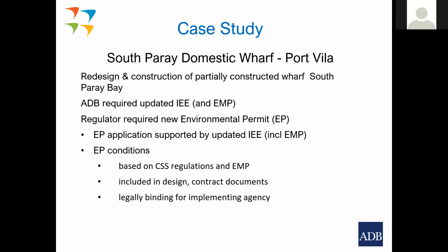Okay, cheers. This first case study for today is South Parade Domestic Wharf in Port Vila. Port Vila is the main shipping port in Vanuatu, and it's vital for serving the outlying islands. In 2016, the construction of the new wharf commenced, but it was suspended in 2017 because of design concerns, and a new design was required, including a new environmental assessment, and the Department of Environment also required an environmental permit.